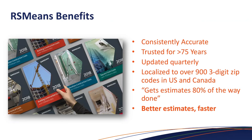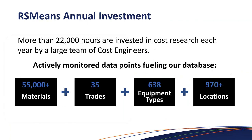The RSMeans benefit: these guys have been around producing construction cost data for over 75 years. It's highly accurate and updated quarterly, taking into account gyrations in the material and labor markets, supply and demand. It's tied down to the three-digit zip code, so it's localized. Their mantra over 75 years has always been to help organizations get estimates about 80 percent of the way there, then use in-house or local knowledge to refine to near 100 percent.